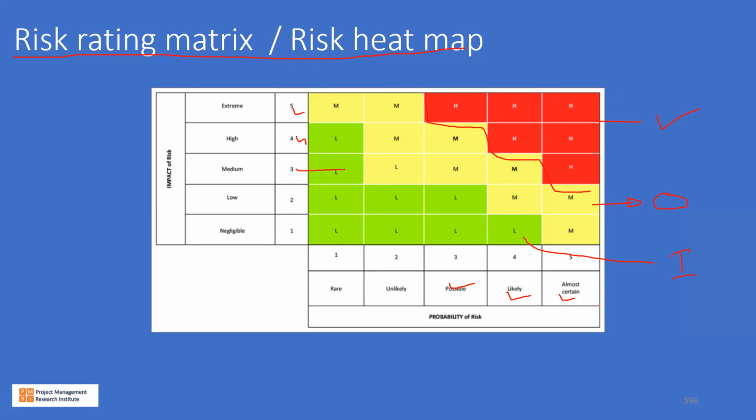There are tools available which will help you to monitor the risk heat map on a daily basis. And if you click on each cell here, you'll be able to do drill down analysis, which will pinpoint the exact area in the project where this risk is happening, the details about the risk, the corrective actions performed, and who is the owner for these corrective actions.